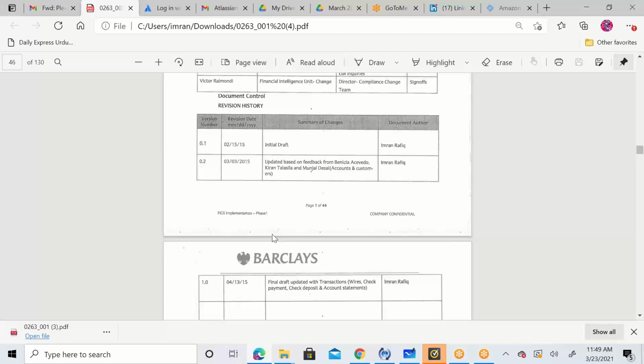So at that point of time, they're going to email you back, replying to your email where you sent this FRD. They will email you back, I sign off to current functionality. So that email you need to save. But if I keep on asking them on every single thing that this is what we discussed, can you approve it or can you email me back, they will just get annoyed.